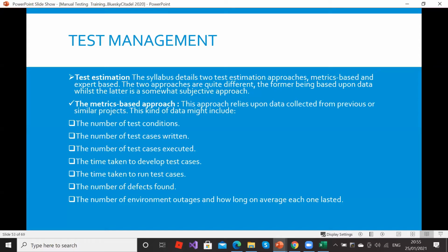So you need to know what you can do. Some will tell you, oh, in a day, I can write 5 to 10 test cases. It depends on how fast you are. Some, it could be two. Maybe the two could be so cumbersome that you are finding a way to link things, because as you're writing the test cases, it has to make sense. It has to marry up with the system.